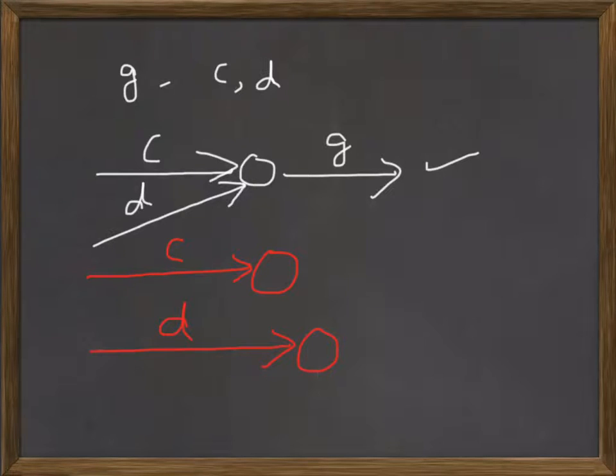So instead of worrying about how to handle this situation, a simple strategy can be that we use dummy activity, and that is shown something like this. By dotted line, I am just connecting these two ends here, and both these dotted lines are representing dummy activity. So I put dummy 1 and here dummy 2. Dummy activities are no real activity, so they don't take any time. So time required for doing these activities is 0.